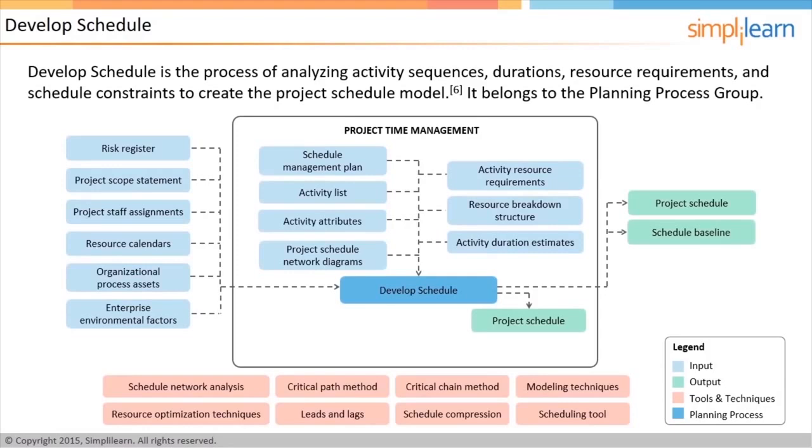Meeting the schedule baseline is one of the measures of project success. Schedule data produced may include number of resources, key milestones, etc. Project calendars specify the available working days and the number of shifts in each day. It indicates how many hours and days are available for the work of the project to be completed.